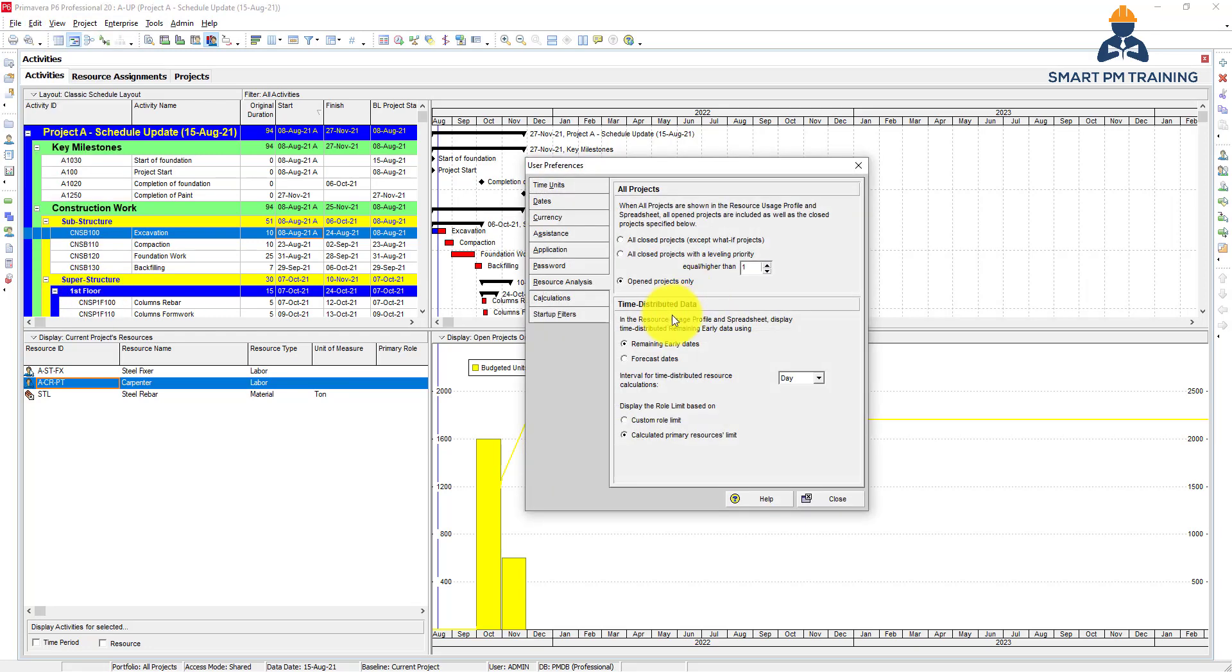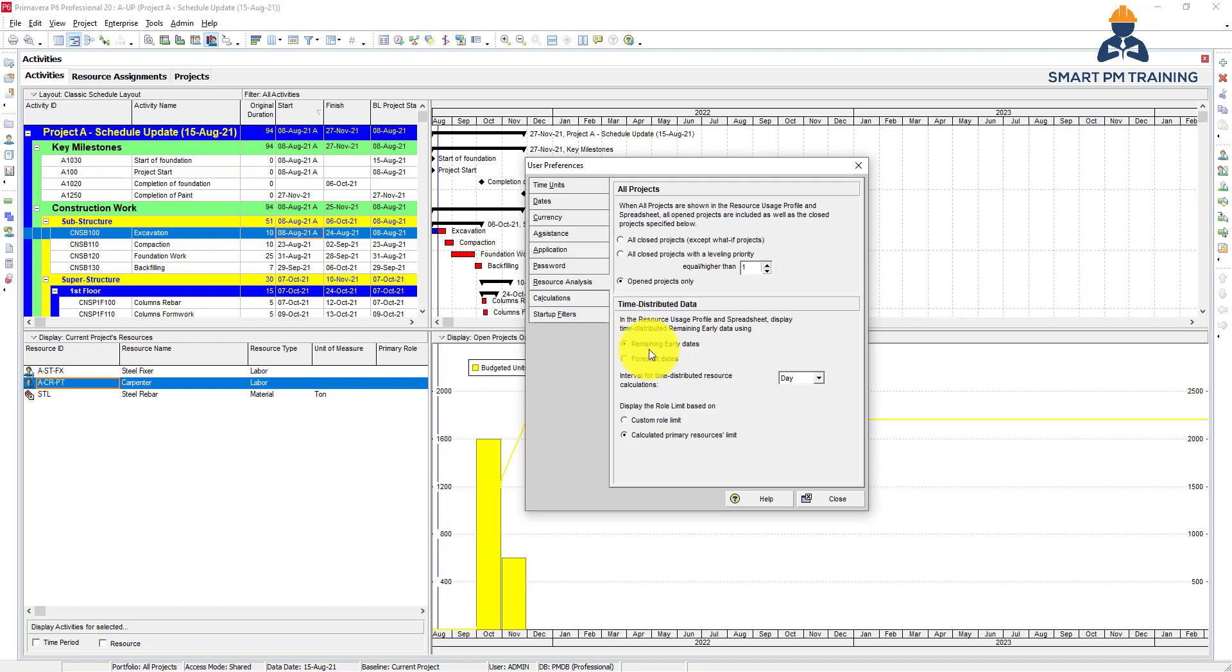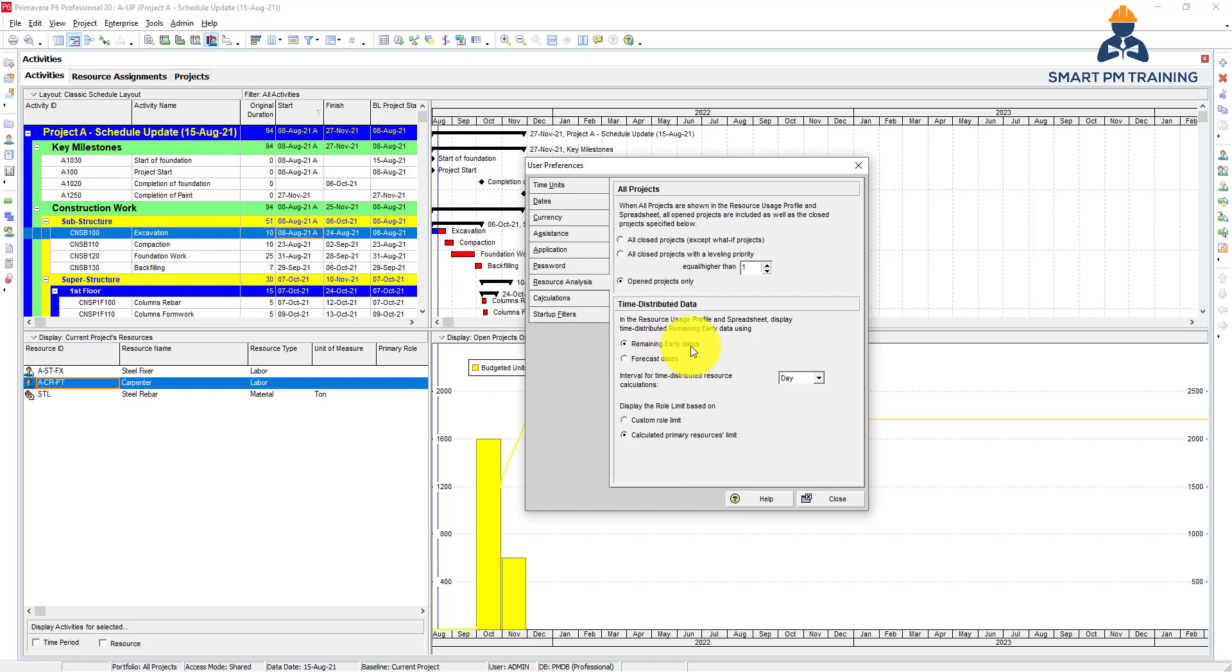Time distributed data, also under resource analysis. So under resource usage profile, you use remaining early dates, of course not forecasted dates, because remaining early dates are generated by the logic, duration, relationships of the schedule. Forecasted dates, it is like manual, it is decided on your own. So if you keep showing information and reporting in your Primavera based on forecasted dates on your own, why do you have a schedule in the first place? So keep it remaining early dates.